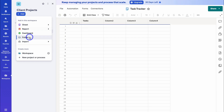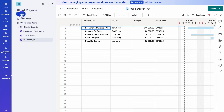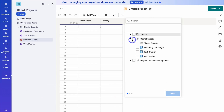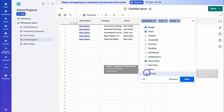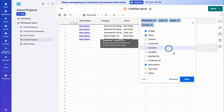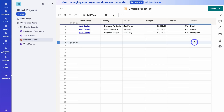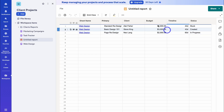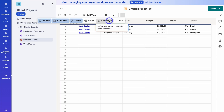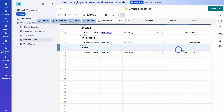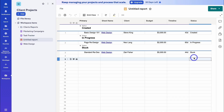Let's navigate over to 'Add' and add a folder — I want to create a folder for client reports. Then navigate up to 'Add' and add a report. Here we can choose a row report (uses data from sheets) or a sheet summary report (uses sheet summary fields). I'm going to click 'Row Report', choose my workspace, locate the sheet, and click Next. I'll add client, budget, and timeline columns. Then click Next — here we can select a filter field, for example budget is less than a value, to generate reports of projects under 10K. We can also add columns, sheets, filters, summarize, sort, and group. These are my projects under 10K grouped by different statuses. The data flows between your reports and your connected sheets, so changes in sheets impact your reports.